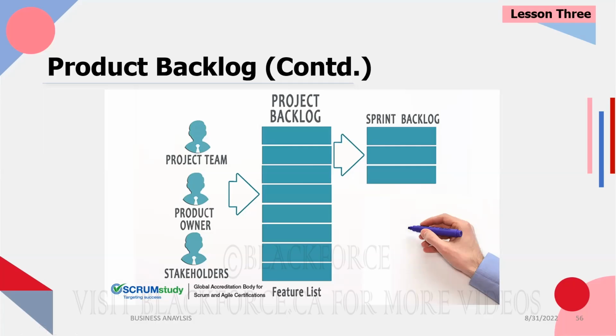However, when you want to start developing the user stories, when the programmers want to start building the functionality, they don't pick user stories from the project backlog. Whichever user stories will be built in a sprint need to be moved into the sprint backlog. So when we get into Jira, you're going to be able to see what I'm talking about.